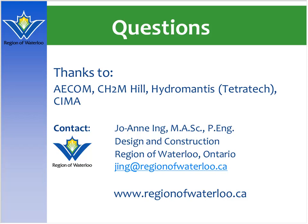And one other final note is the tertiary treatment. We looked at sand filtration and compared that to the tertiary filters, and we decided, from the value engineering, that it was better to consider tertiary disc filters because we would not need an intermediate pumping station and additional tanks for the sand filtration.